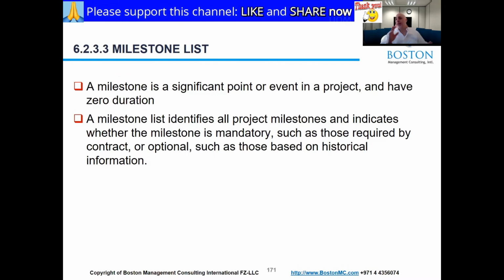And for milestones, you have minor milestones and you have major milestones. Major milestones are really for management, minor milestones are for us. So you can have different levels of milestones. I have no way of marking it as minor or major on the tool, but some things are for us, some things are for management. We let them know that something significant is complete, like the site is ready, we can do the move, things like that.